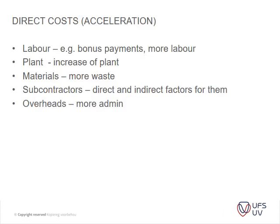Looking at direct costs — these include labor (for example bonuses, more labor needed if you accelerate), plant (you need to increase your plant), materials (more waste is produced), and subcontractors. These are the direct and indirect factors contributing to your costs.